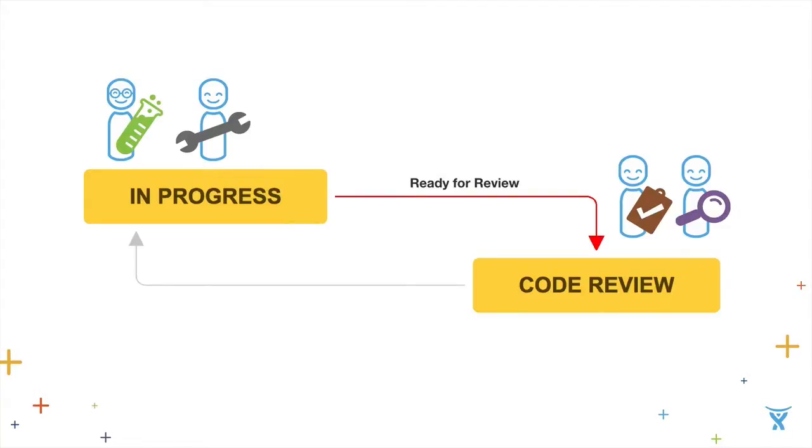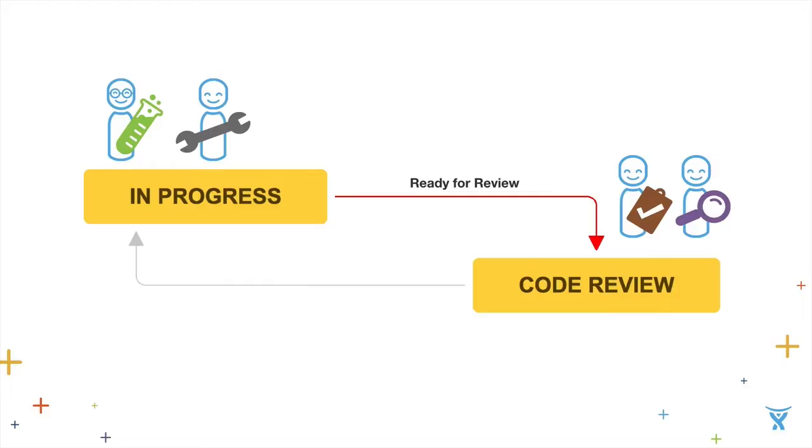When we think about the definition of done, oftentimes we think of that as what is the final output. But really, there's a series of transitions that happen in every workflow, and there's a definition of done that happens with each transition. For example, in progress to code review, a common transition for software teams. What is the condition of done that allows you to transition from in progress to code review? Is it that the code's written? Is it that it's checked in? Is it that it's built? Has test looked at it? Making sure that each person in the workflow understands their preconditions and their post conditions makes the workflow more effective.